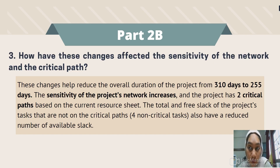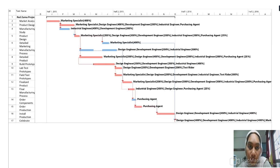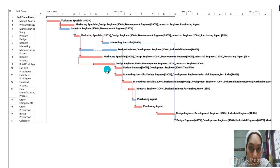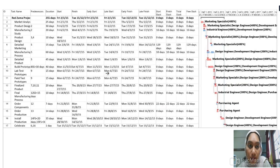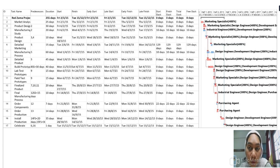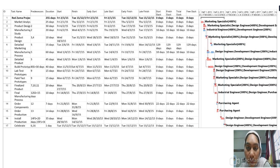Overall, these changes help reduce the project duration from 310 days to 255 days. The sensitivity of the project network increases, and the project now has two critical paths. The total and free slack of the four non-critical tasks have also reduced in comparison to the initial slack.